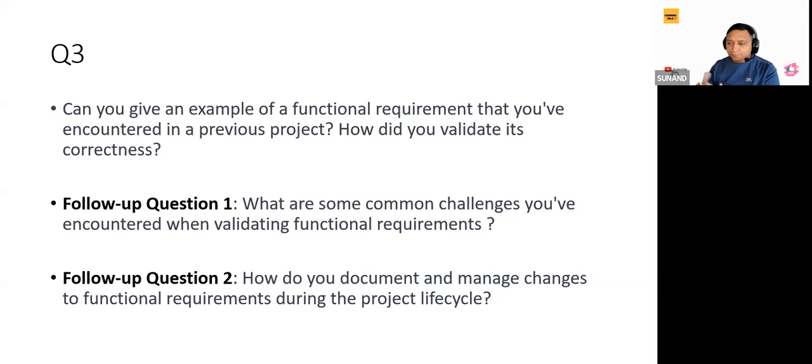That's again, I would say, an important step. And then update all the project documentation, including the requirement documents, design documents, and test cases to reflect the approved changes. And of course, at the last, communicating the changes to the entire project team to ensure everyone is on the same page.